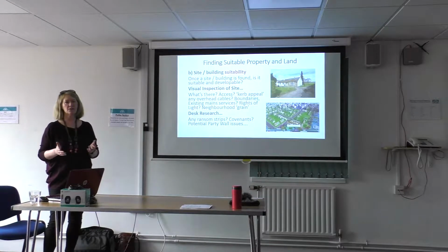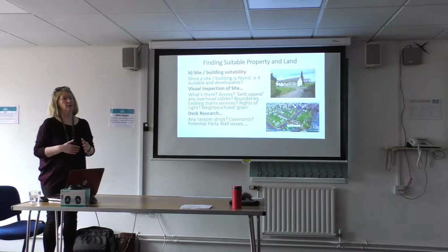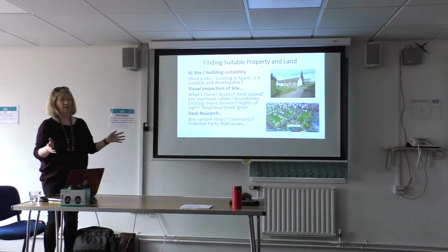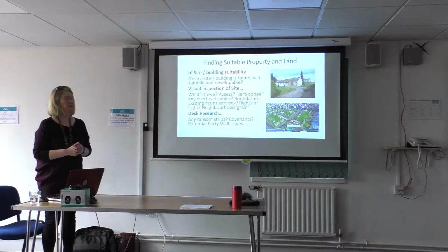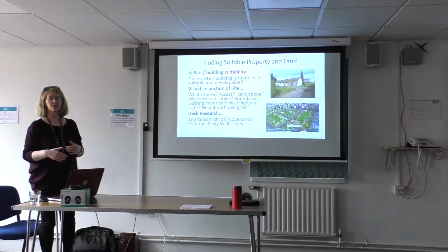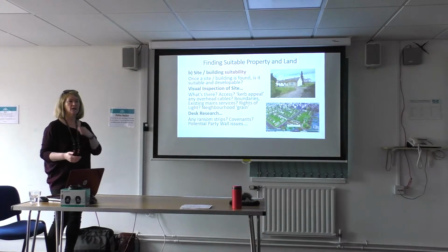Existing main services. So on a greenfield site, there probably isn't any services. There isn't water. There might be electricity passing by it, but there probably isn't electricity on the site. There might not be drainage, and those are sort of things that are going to be really expensive to add. So obviously, if you're in the town, you can assume that there's going to be some main services, which is obviously going to make life a bit easier.